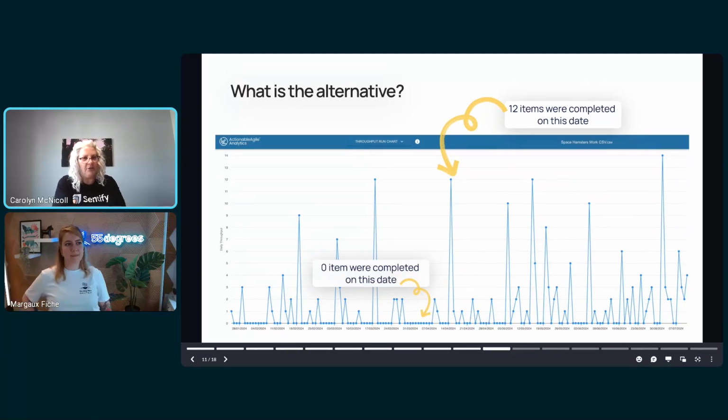So it's something that you don't just forecast. This is another big difference. You don't just forecast or predict on one day where you would assign a point to the work. You would have your meeting, assign your story points, and then start your sprint. But in flow metrics world, you look at your history, you figure out what you can handle in a time frame, so you pull that work in, and then you watch to see if you're staying on track and getting the work done in time. And that's typically something a scrum master would do, or a leader.